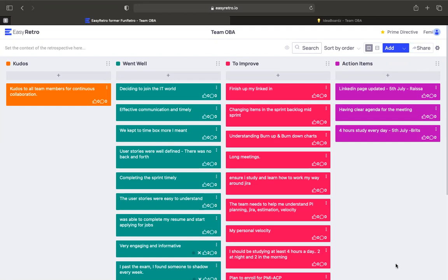And I would look through the first item and say, oh, hey, Raisa, were you able to get your LinkedIn page updated? Hey, Brit, were you able to dedicate those 4 hours of study every day? Every new retrospective, you start by reviewing your last action items, right? If you're talking about having a clear agenda for the meetings, at the next retrospective the Scrum Master is supposed to ask your team, okay, how are we when it comes to meetings? Are they still very long? If they're still very long, then something is wrong. Then what do we need to do better? Things of that nature.